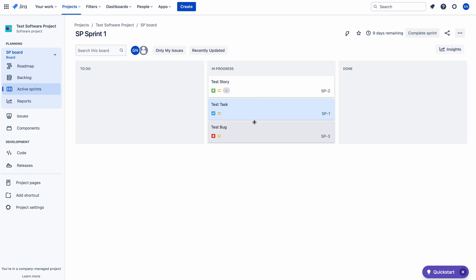And in some cases, even though the board is having the correct rank — that is ascending rank — few people are still unable to rank the issues. There are two permissions required to rank the issues, in addition to the correct board query filter. The user who is trying to rank the issues must have two permissions.